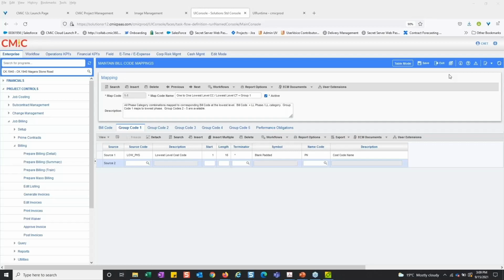Now, what might be more effective though is on the SCO, the subcontract change order. Because remember, when you post the PCI, it creates your subcontract change order for you, and the subcontract change order is what we see on the request for payment. So you could get to the same end result by just using the subcontract change order, which you certainly can have the billing backup for.